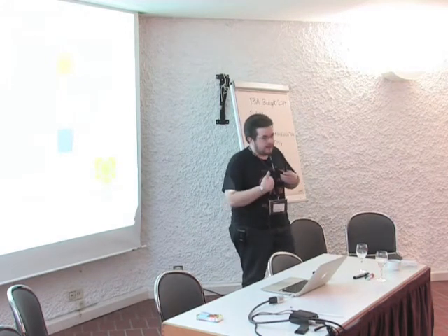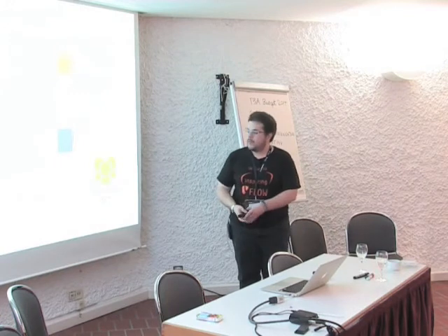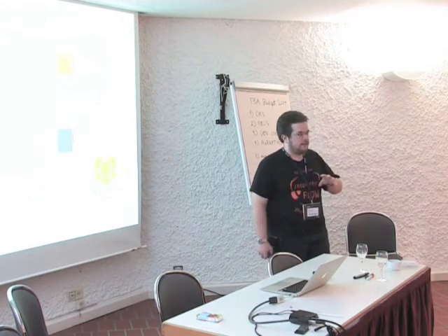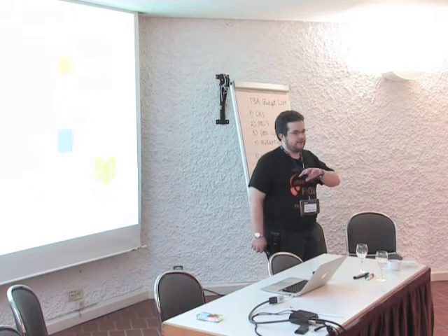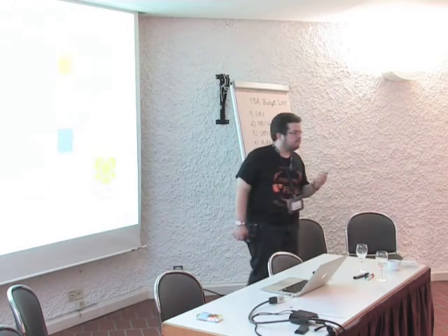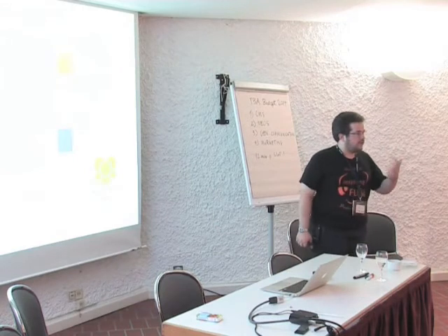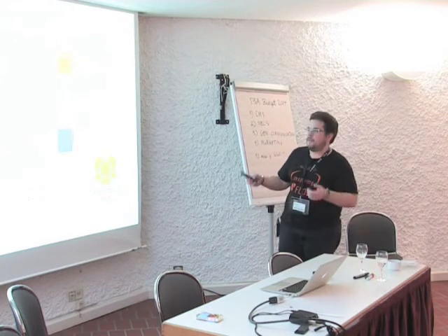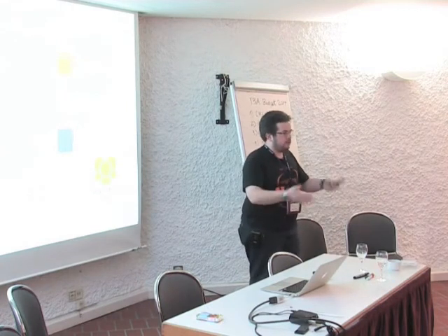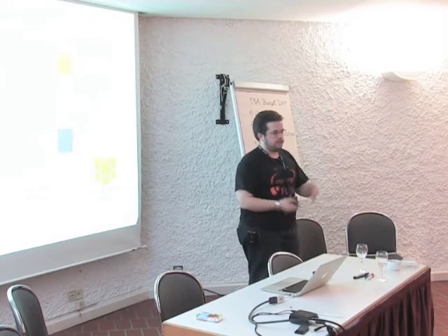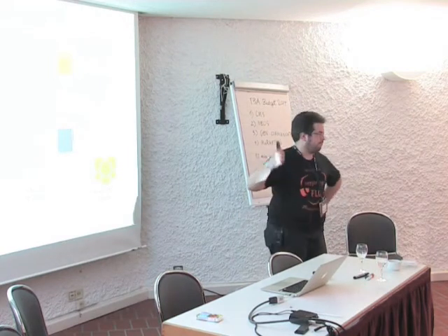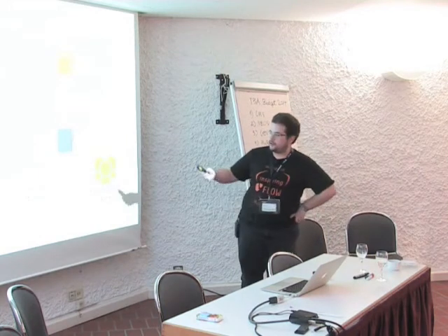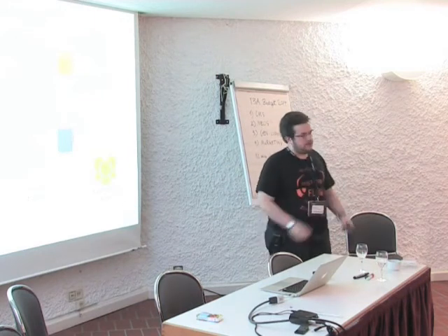For instance, as a developer, I often put user stories that represent non-functional requirements into the product backlog, because that's something that a product owner who comes from a business perspective usually doesn't think about. For example, as a user, I want quick response time so that I can use the site fluently. Or as a user, I want a secure application so that my personal data is adequately protected. These are non-functional stories that anyone can put in the product backlog.